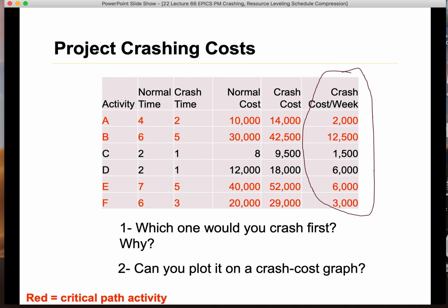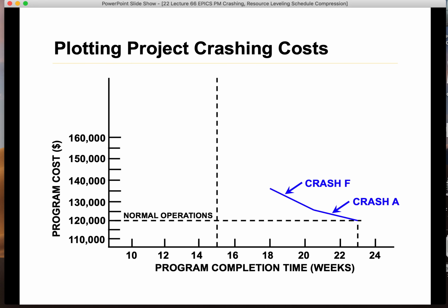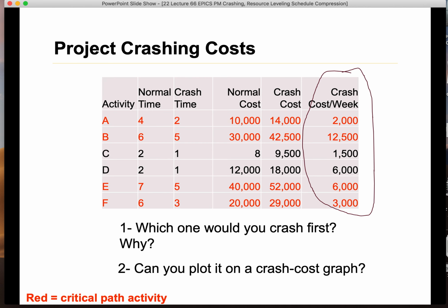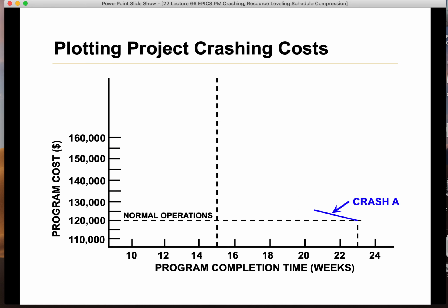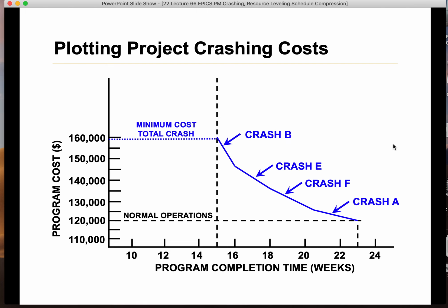I can hear what you're saying. You want to continue with F, because with F you can crash 3 weeks at 3,000 per week. Okay, so it brings you all the way to 139. Okay, so which one would you like to go next? You want to go with E and you want to go with B.